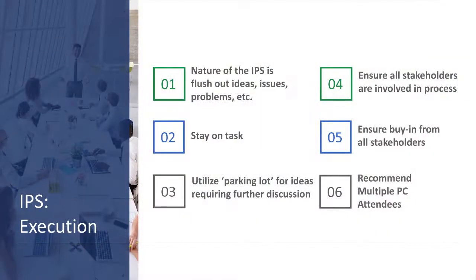More often than not, we have 2 projectors running during all our planning sessions. One for the schedule, the second for notes and action items and drawings that are being put up. Actually, I'm going to jump to my last bullet here. I recommend the project controls team that's running this IPS, don't do it with 1 person. If you can afford to have 2 there, do that. They're really doing 3 different things. They're developing a schedule, they're taking action notes, and they're also documenting the overall process and where we need to go to.